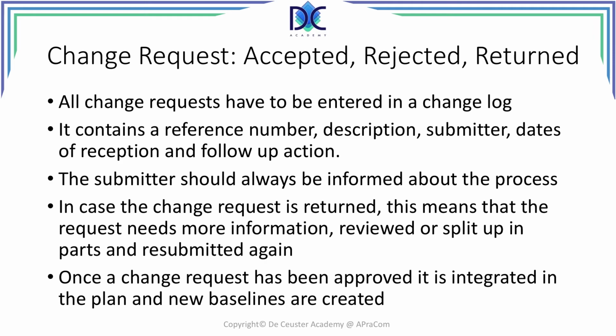Let's see what happens when change requests are accepted, rejected, and returned. Of course, we know that all changes have to be entered in a change log. Every entry has a reference number, a description, the name of the submitter, date information, follow-up actions, and so on.